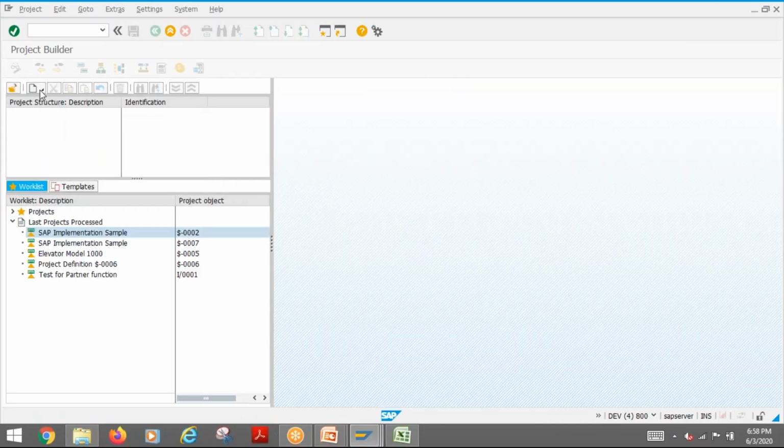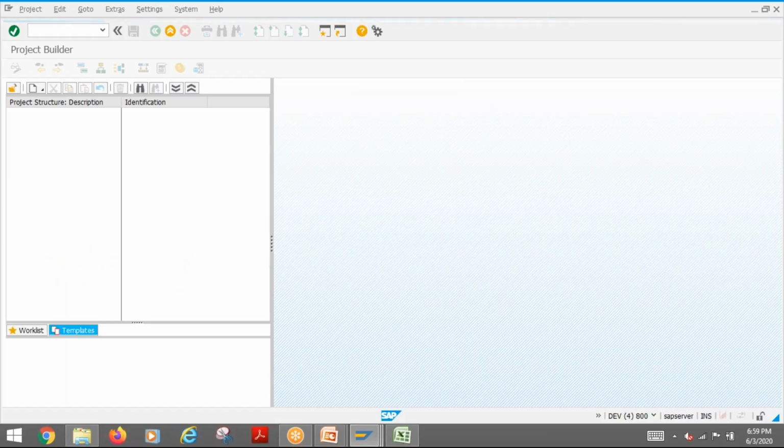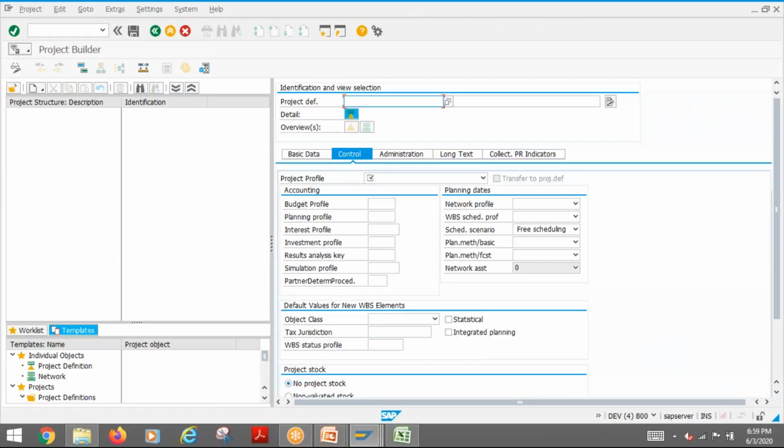It will restrict you to either the company code currency or the controlling area currency, but you can do the posting in a different currency. Posting, I agree with you, but what is the meaning in controlling? Because the project system always works from the controlling perspective, ultimately all the control will happen from the controlling area currency. Whatever currency you use will be converted to controlling area currency.